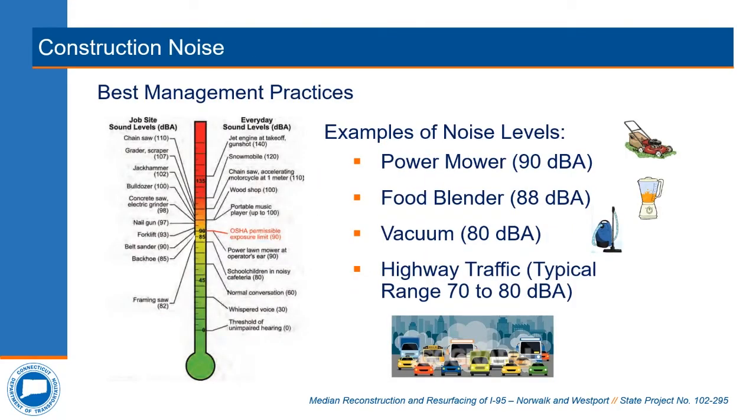Somewhat related to night work, but not exclusively so, is the issue of construction noise. Generally speaking, DOT follows state and OSHA guidelines with a 90 decibel limit for construction noise exposure, which is equivalent to that of the noise generated by a power mower. If a party files a noise complaint during construction, DOT will perform a due diligence investigation. If the observed noise level at the point of reception exceeds the 90 decibel limit, efforts will be made to reduce the noise level at the point of generation.